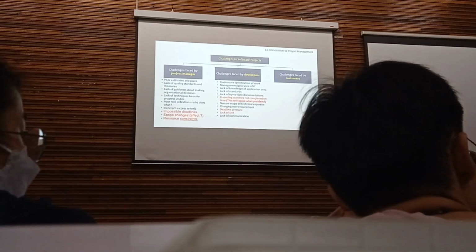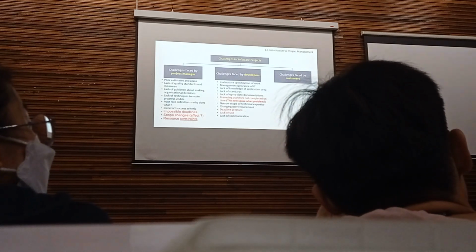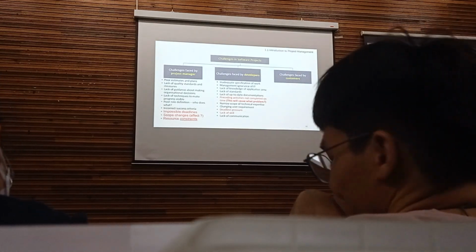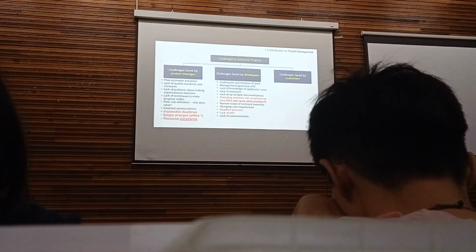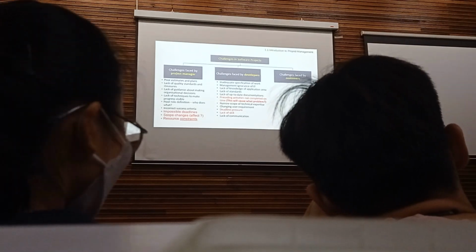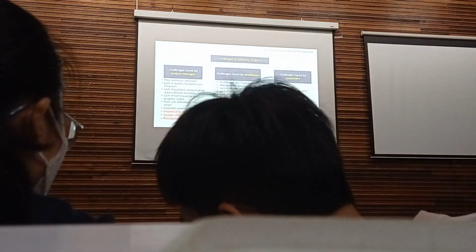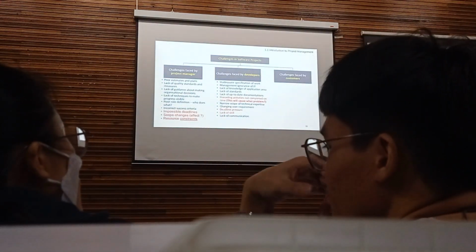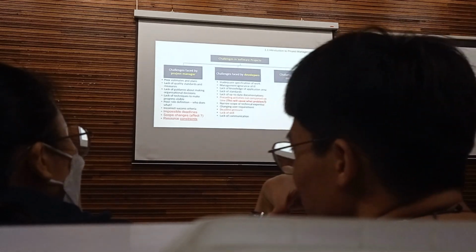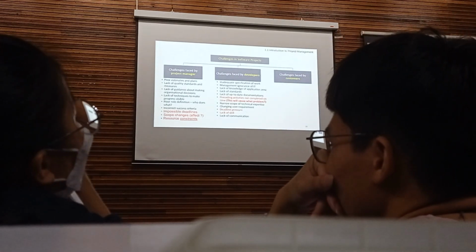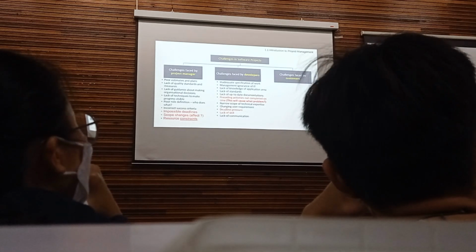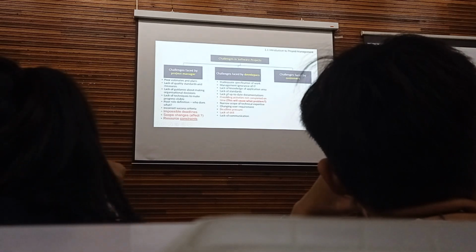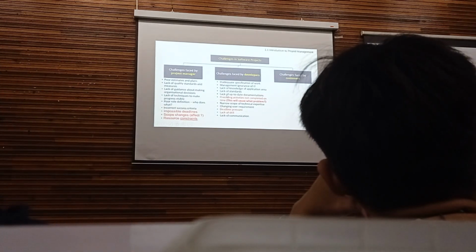Okay, but Jack is not able to finish in 10 days. Jack spent 2 more days to complete task 1. So Jim only has 8 days left. This is one of the consequences, one of the problems faced by developers.